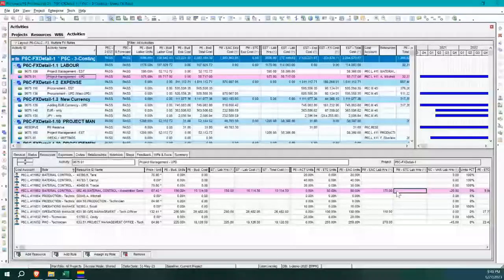And we want that to calculate, understanding that we have burnt up some actuals here. We don't want to double dip. We don't want to type 90 in here because this would be a double dip. Okay, but we do want it to understand that 90. So this is where we've got a lot of nice smarts here in the way that P6 works.